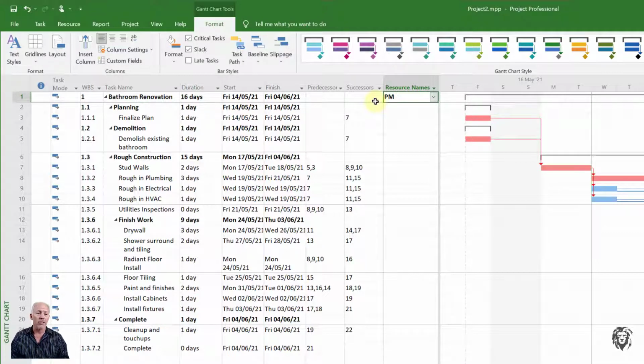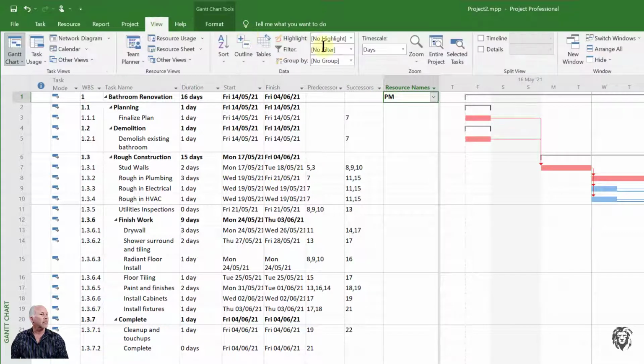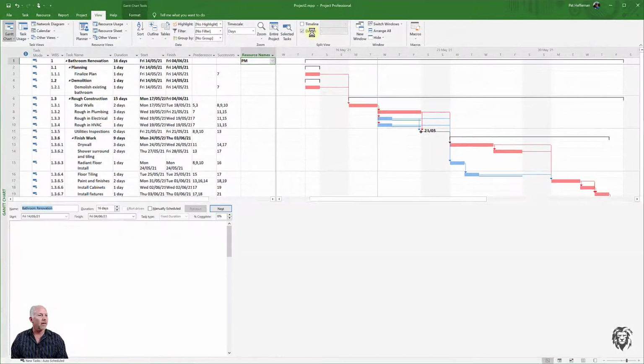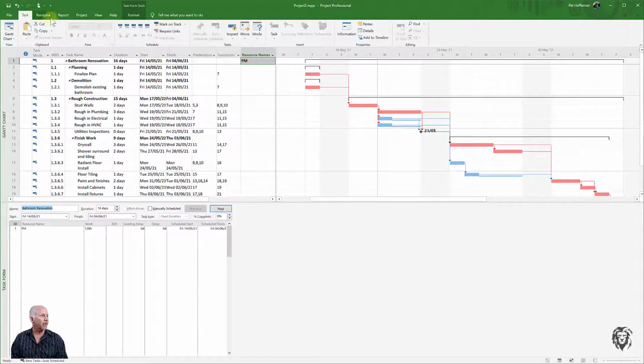So there are a number of ways we can do this. Let's bring in my entire project. So remember the details box, and there's a number of ways that we can bring it out. Let's go back to task. We've got details chosen here, and we can go down in the details, and you can see in this particular view, and we know that we can adjust how that is shown. We see resources here, and so our project manager is listed under those resources, and we can see that they're giving 128 hours of work, which is 16 days, to the project. And we could adjust this down to be some other amount of hours that we want.